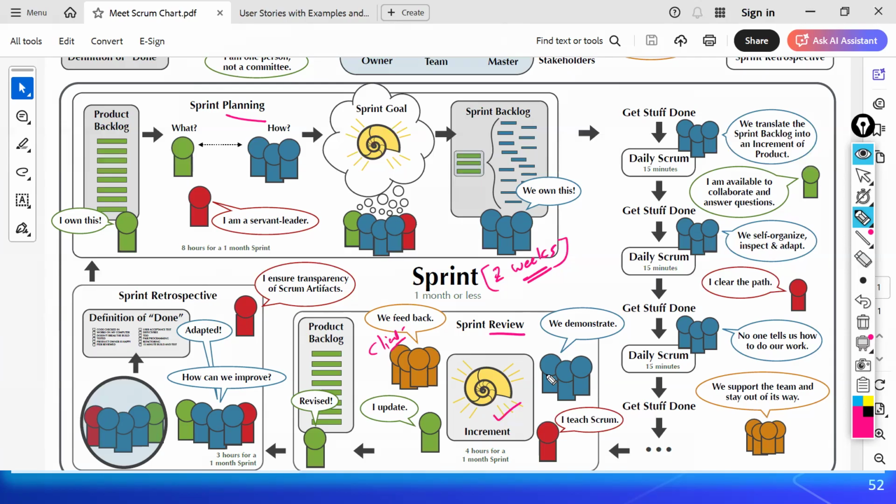That's how it is. So in the sprint review, yes, you are going to call in the client. The client will provide feedback on what you have developed in these 2 weeks. The technical development team will demonstrate that, hey, we have developed this, and the client will provide feedback: adding a new feature, removing an old feature, or fixing a bug.